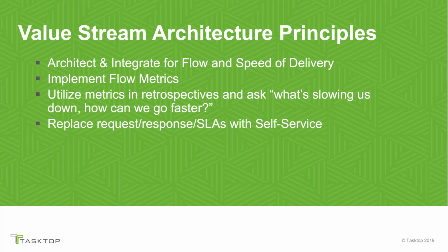So they implemented a self-service SLA, and when they needed the security team to look at it, it was put in as a request, and the security team did it ad hoc. And the only way they knew this was happening is because they implemented the flow metrics and saw this huge wait state and then dug into it. Everybody knew it was there, but no one really popped up and said this is a problem until they saw how it affected the efficiency.